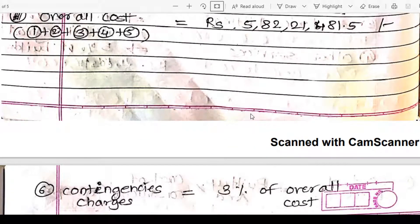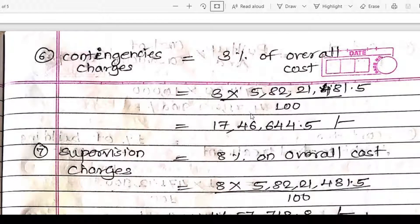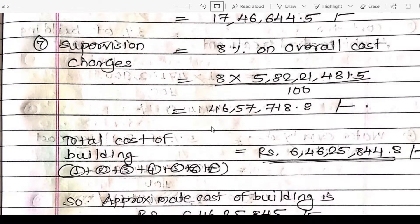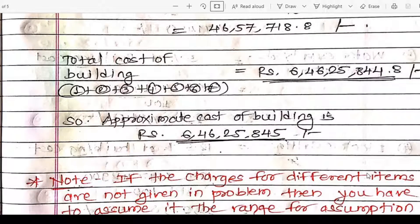Contingency charges of 3% and supervision charges of 8% are always applied on the overall cost of the building. Adding these to the overall cost, the total cost of the building is 6 crores 46,25,844.8 rupees, approximately 6 crores 46,25,845 rupees. This is the approximate cost of the building.